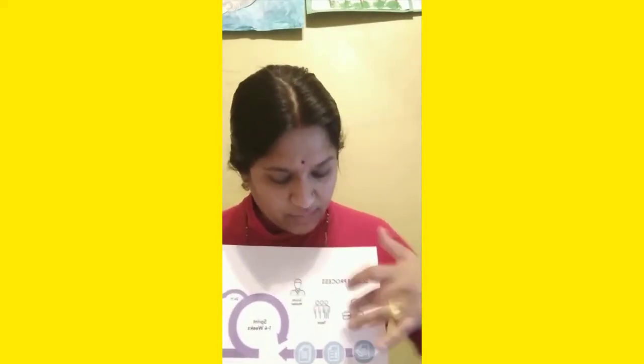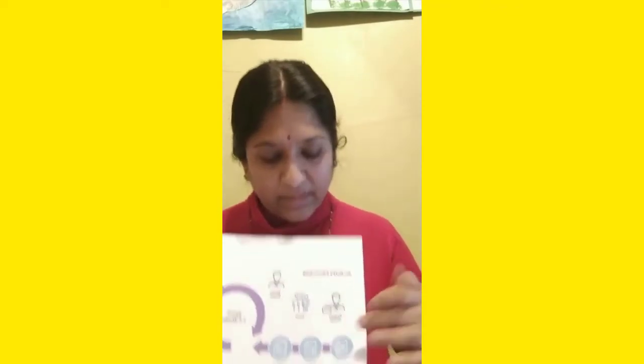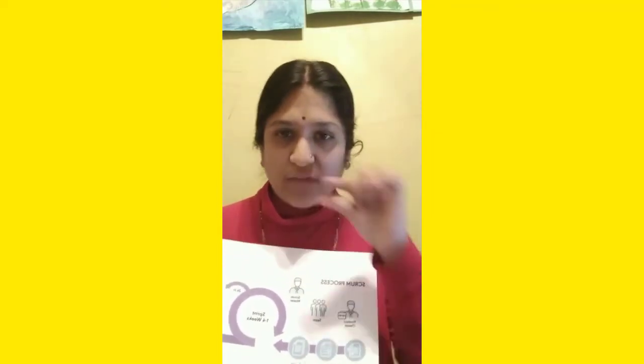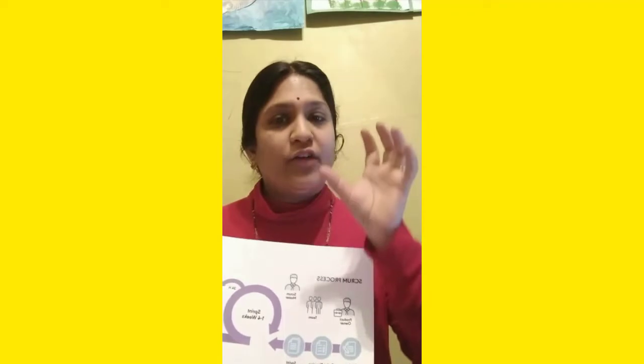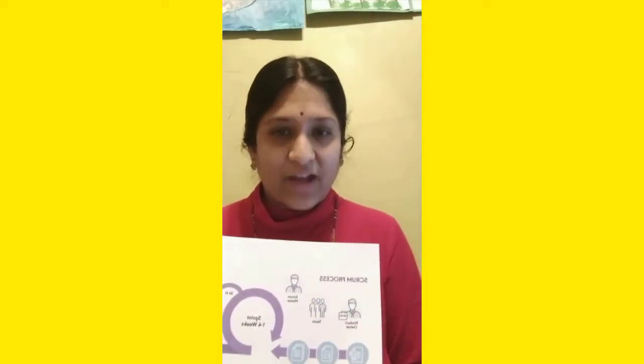So let's go to the sprint planning meeting. All these people sit together and discuss what needs to be done in the planning, and from the product backlog, they take the highest priority to-do list and make a shorter to-do list, and that is known as the sprint backlog. After the sprint planning meeting, they make a shorter to-do list of the things which are necessary for that one week to four weeks of time that this development team can complete in that period. They take those things and make a smaller to-do list, and that is known as the sprint backlog.